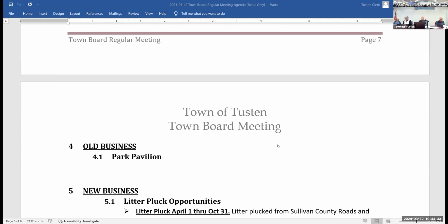Build it up. This particular design building, I believe they said was a 2-foot interference because it's a post building. There's not a big space that the water would go through. So they take the number of beams and they get the circumference of the number of beams that's in there. So by being able to reduce them down, I believe he came in with a 2 square foot amount that it would impede. If you're within the floodplain, you do not want to impede water that goes through the plain in the event of a 100 or a 500 year. That's what the certificate is.